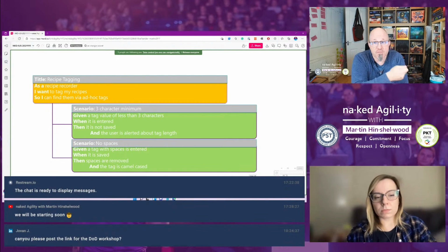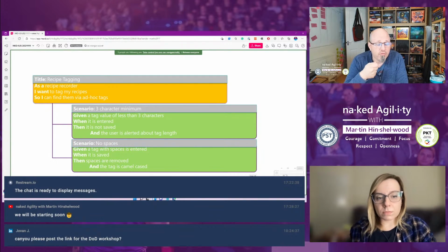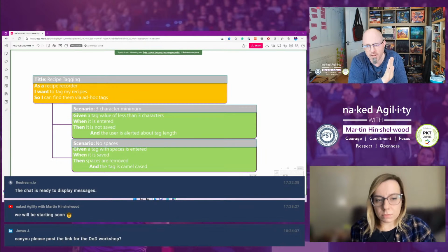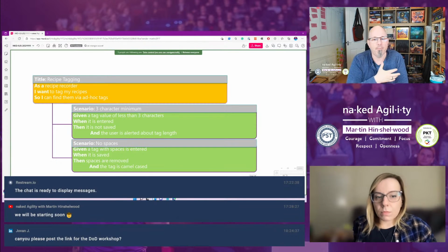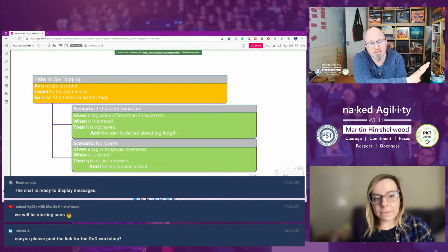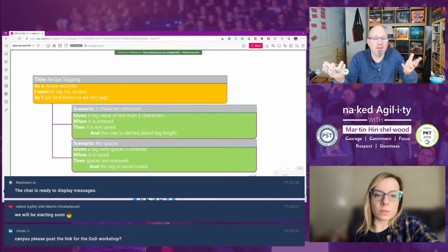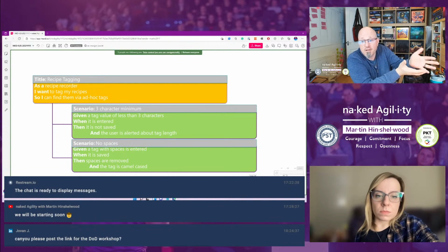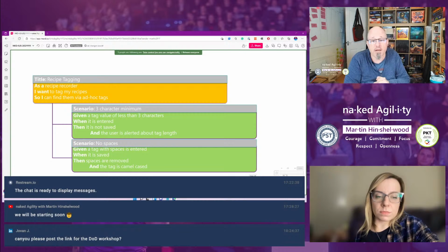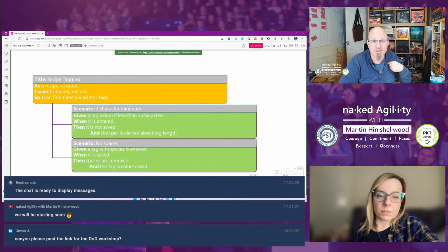So one of the advantages of scenarios is there are a bunch of tools out there that can turn these into tests automatically. Not completely automatically, we still have some work to do. But there's SpecFlow I've used in the .NET world where you can write it like this and it generates the stubs for unit tests that then developers fill out, and if they pass, it does that. So there is tooling around that, but even just having it written like this, Julong was looking at this going, yeah, that's how I want it written, so that I know what I need to build.